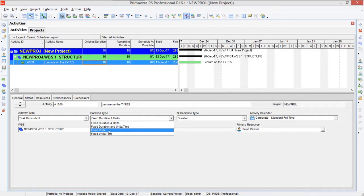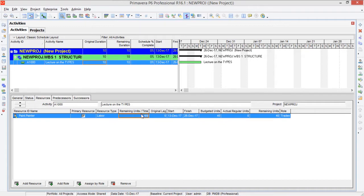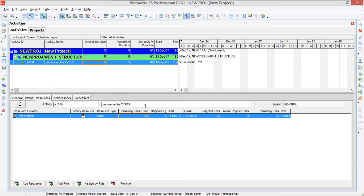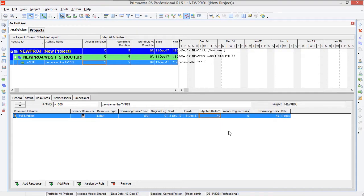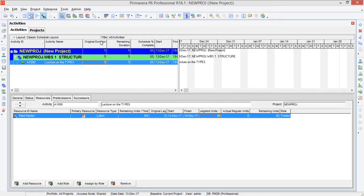Now let's look at Fixed Units per Time. If I set the duration type to Fixed Units per Time, this means that our units per time will be fixed. Let's reset everything to the previous values: duration to 5 days and units per time to 8 hours per day, with budgeted units at 40. So by default, before setting our duration type to Fixed Units per Time, our settings were: 5 days duration, 8 hours per day unit time, and 40 budgeted units.